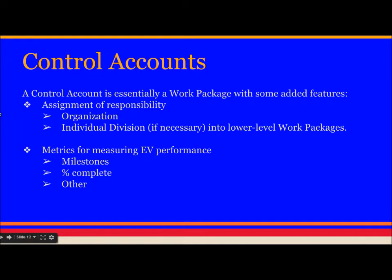A control account is essentially a work package — the lowest level of the work breakdown structure — with added features such as assignment of responsibility to an organization or individual, and division if necessary into lower-level work packages. Metrics for measuring earned value performance include milestones, percentage complete, and others.